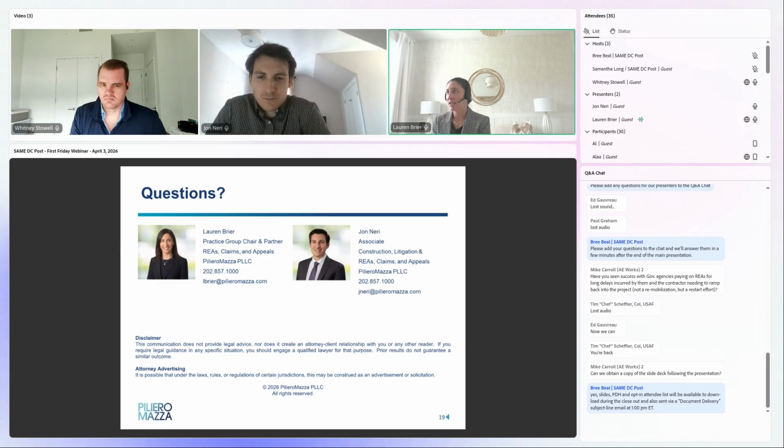So again, it's a government claim. The only way that you can challenge that is appealing it to the Board of Contract Appeals or to the Court of Federal Claims and jumping right into litigation. What we typically do, particularly for our small business clients, is we try to have a call immediately with agency counsel to basically say, hey, we're dealing with a small business here. They can't afford to have this out on their SAM. They can't afford to have it out in the CPARs. Let's see if we can short circuit this process and reach some form of negotiation to convert this to a termination for convenience. Sometimes agency counsel is willing to have that conversation.